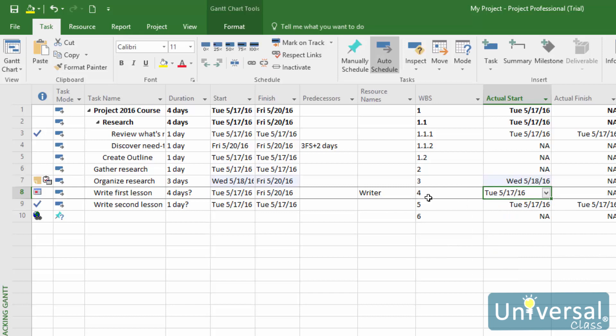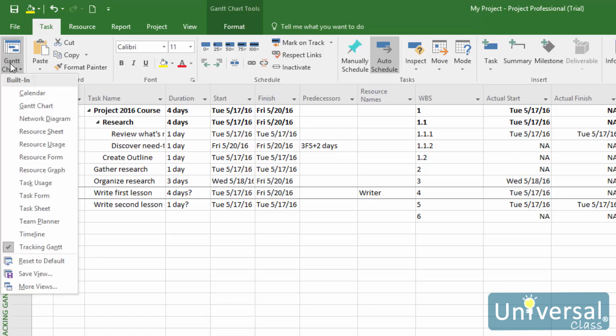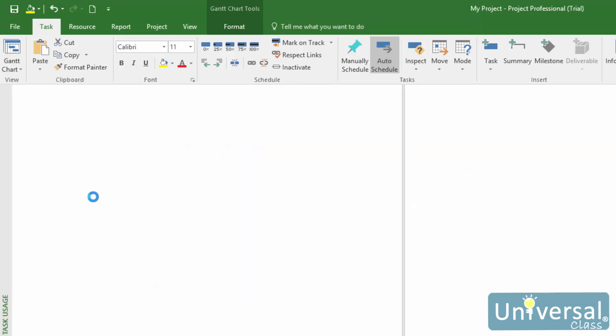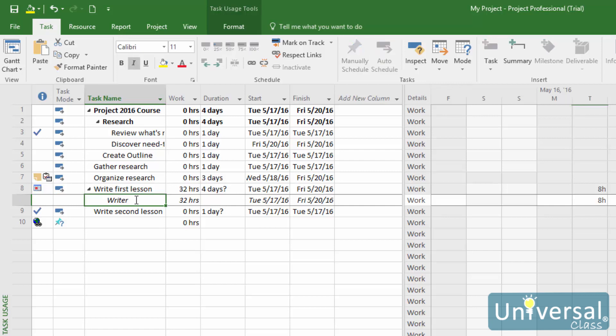It is important to be able to tell how many hours a resource spends on the project. This is especially important if you have employees or contractors working on the project. Here's how to enter resource hours. Go to the Task Usage view by clicking the dropdown arrow for the Gantt Chart button, then select Task Usage. Find the tasks that you want to track along with their assigned resources. Resources are listed in a row below the task name.